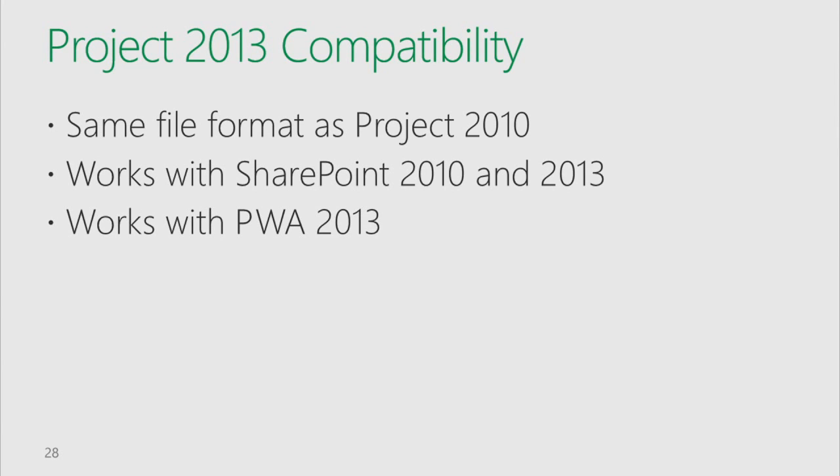It works with SharePoint 2010 and SharePoint 2013. If you're trying to do SharePoint tasklist sync, as someone back there mentioned, with 2010 you will get the old SharePoint tasklist experience. You have to be in SharePoint 2013 to get the new greatness. And Project 2013 works with PWA 2013. It's the only version of the client that works with PWA 2013, so Project Online or Project Server.